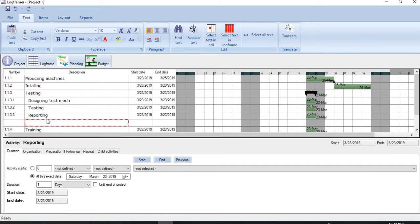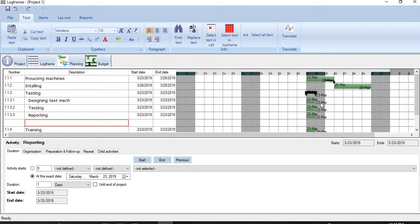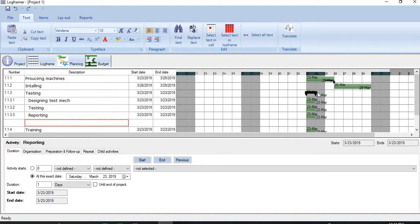And you see, so all three activities, they are now subordinate of the testing. And in the bar chart also you see here, the black bar. This curve is showing that this is a summary task, just like we see it in MS Project. And these are the subordinate activities.